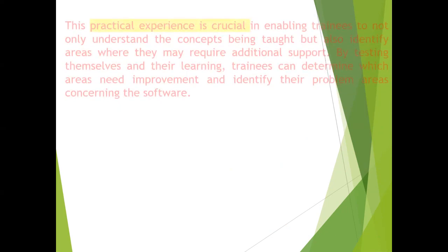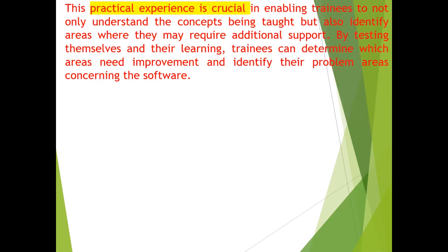The practical experience, as I told you, is very crucial and important for you as an attendee. You understand the theoretical concepts because we discuss in depth how to set up the various factors inside Primavera, and how, from the overall program, you take out a portion of the program. For example, my project has 25,000 or 5,000 activities. From that program, I just want to know the activities related to the authority approval, so that I can give them to my stakeholder engineer who is dealing with the various authorities.